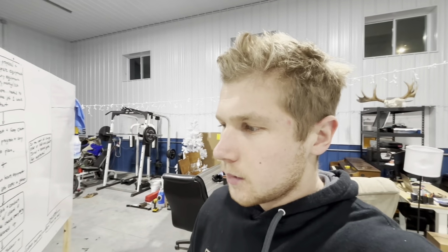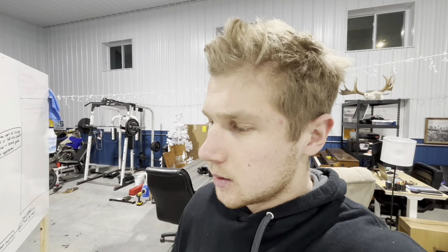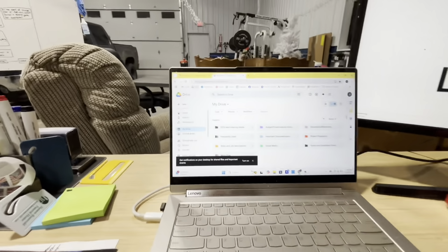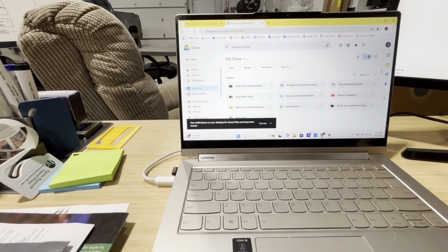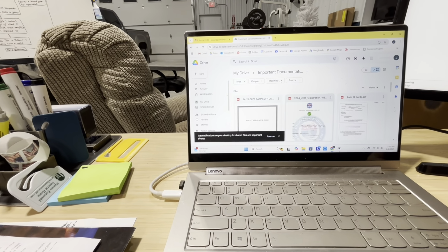So I have a spreadsheet that I made. I can probably put it in the video, maybe. Not super good at editing, but get that in the video. It's a spreadsheet I made. You plug in hours, how many guys you need, mobilization costs, equipment you need, materials, just breaks it all down. Enter in your profit margin goal, 25, 30%, and it spits out a number. All right, guys, here's the sales funnel, or not sales funnel, the bidding template I was talking about.